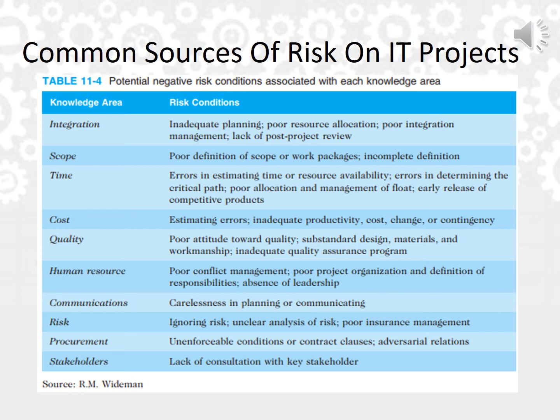We said that in the scope, try to focus on what to do and what to cover, and what are the things that you will not do, that you will not cover, so it will be clear to all stakeholders, rather than during the process of developing, you will find somebody will say, no, I want this, I want that, why did you include that? So that's important to avoid such a risk condition, try to make it clear.